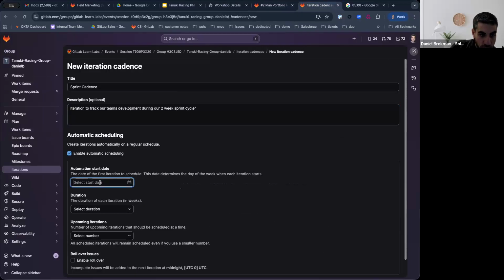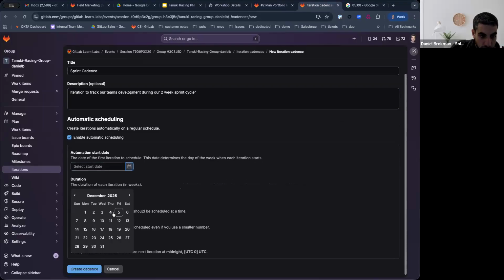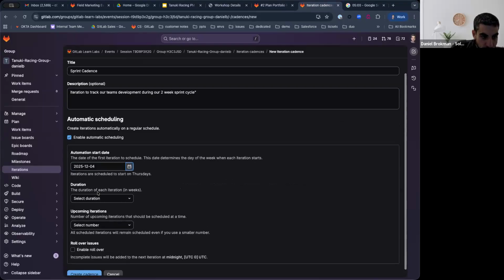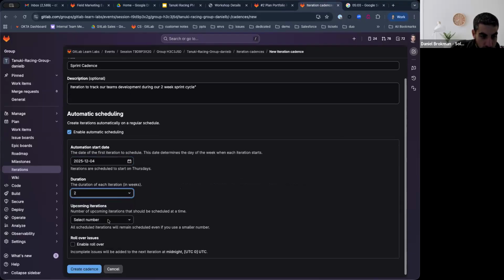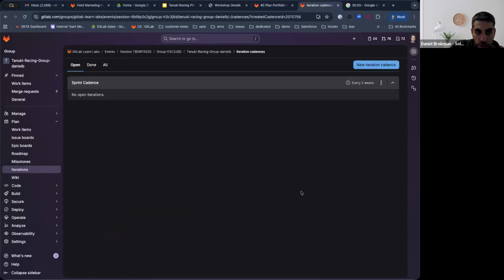Start date is today. Duration, 2 weeks. Upcoming iterations, 4. That's 5 in total. Okay, so that's what we are required to do with automatic scheduling. Create.